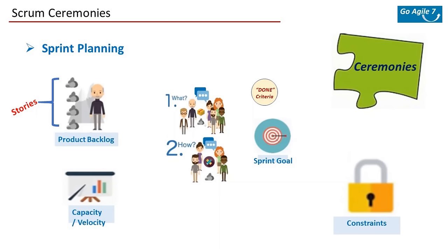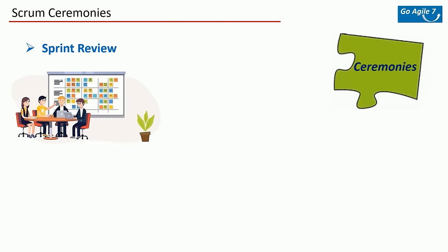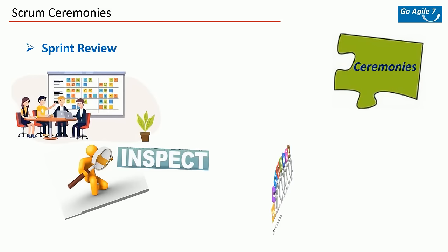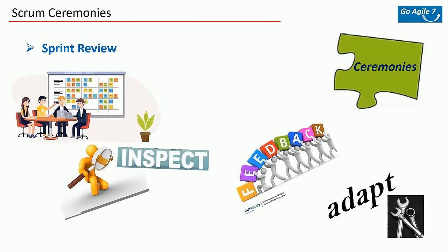The third ceremony is Sprint Review. Just like we begin a sprint with Sprint Planning, we hold a Sprint Review at the end. We review the work product — inspect the increment and make sure the product meets expectations. Business stakeholders are also invited to provide feedback and suggest improvements to adapt going forward. The backlog is adjusted accordingly. During Sprint Review it's not about reviewing documentation — it's about demonstrating the actual tangible product developed so far.